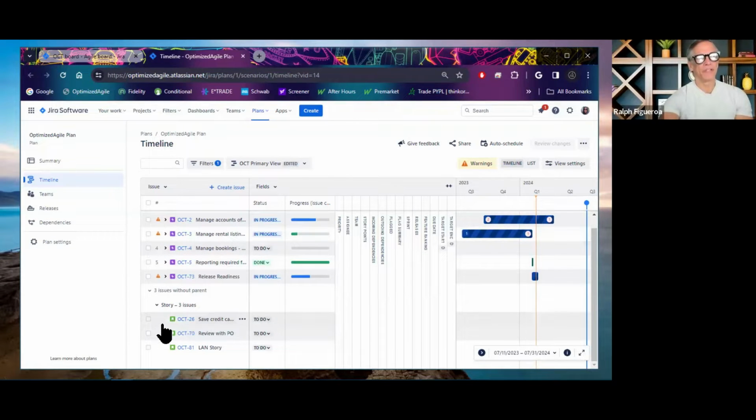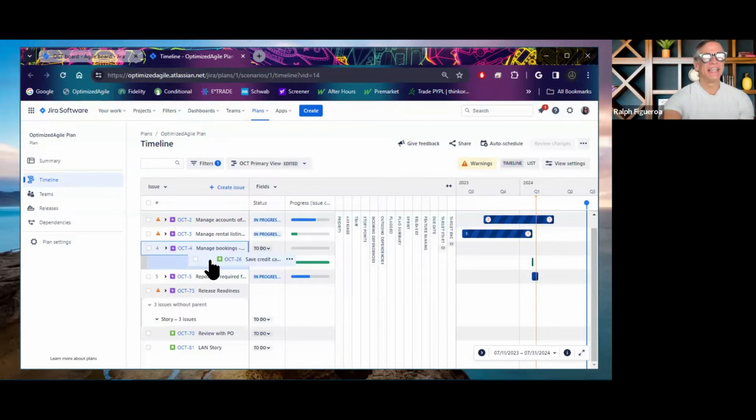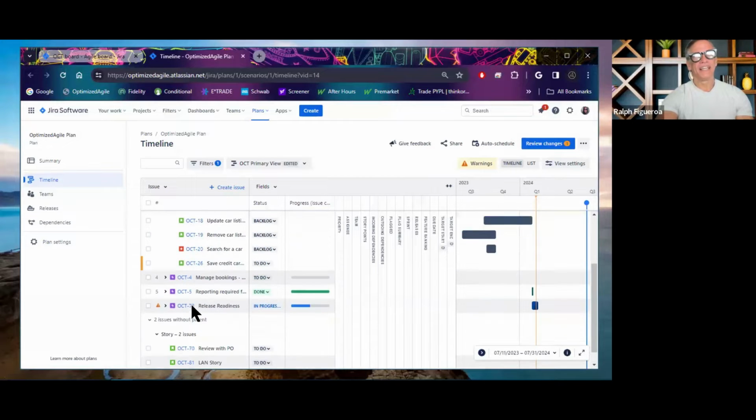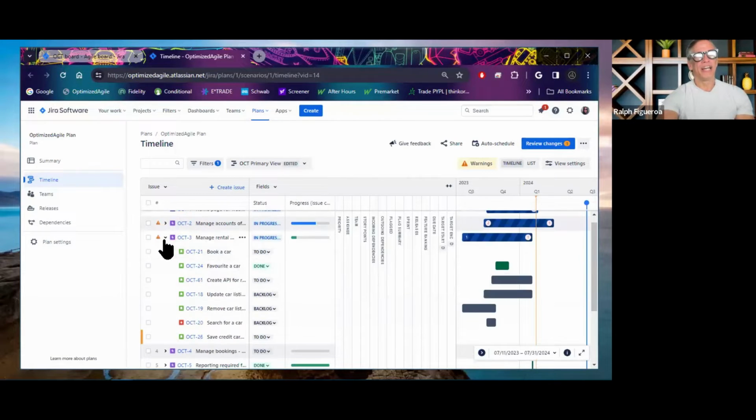And if you recall from last week's session, if you are the PO or the engineering manager or an engineer and you realize this story belongs to this epic, rather than going to Jira and opening the Jira ticket, fishing for the epic link field and typing in the epic number, you can drag and drop stories, and that will bind them to that epic.